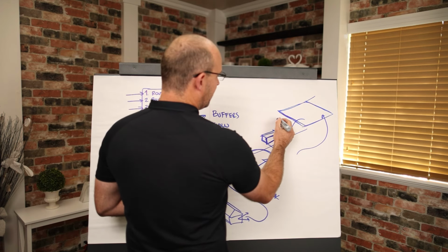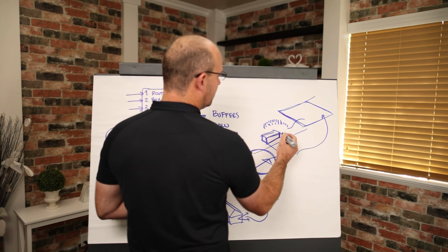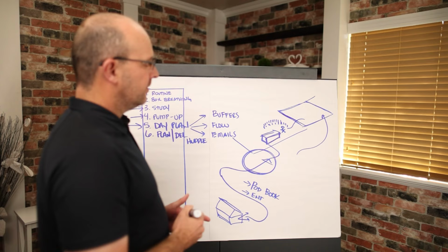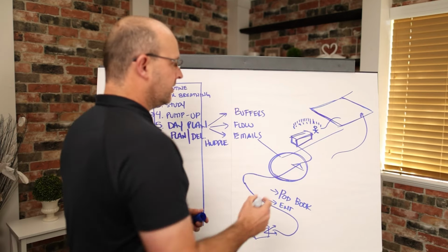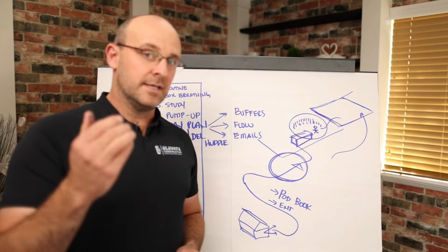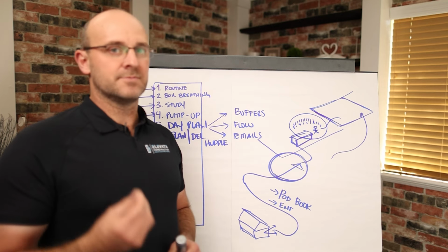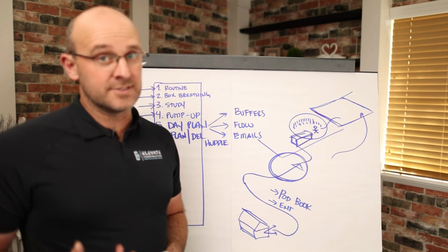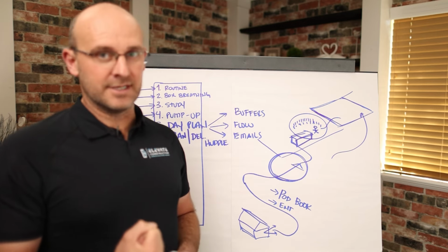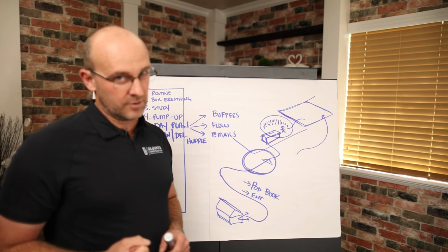The workers come and they huddle en masse outside the trailer or wherever your huddle area is, and you get ready to go out there and deliver a morning worker huddle. And what that is, that's where you and one social group communicate to all the workers on site the plan for the day. You provide shout outs, you receive feedback, you talk about inspection, staging, you do about 2 minutes of training, and you provide that culture, and you really create a nice cohesive team. So that's step number 6. You will plan and deliver the morning worker huddle.